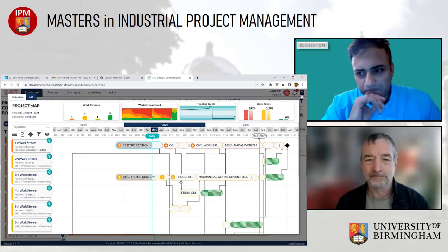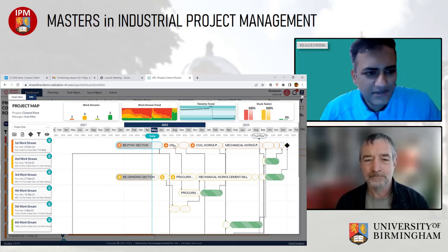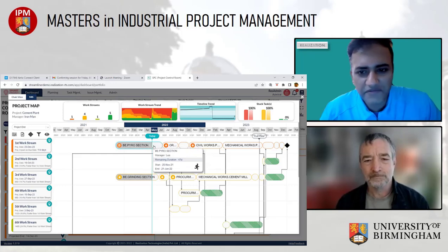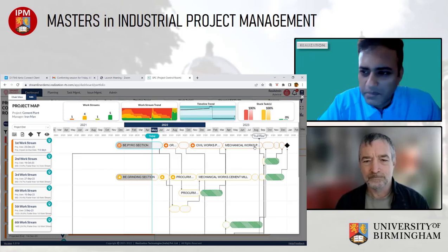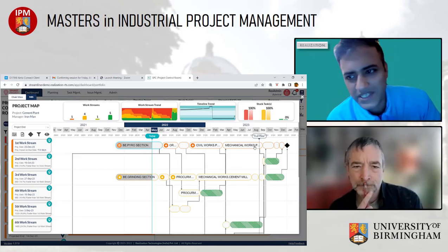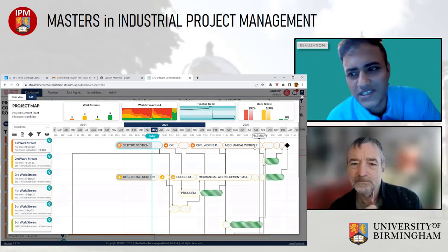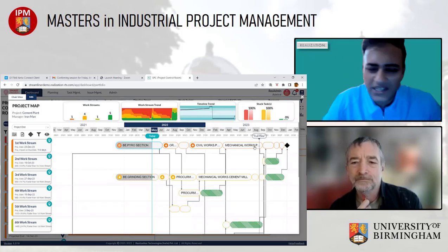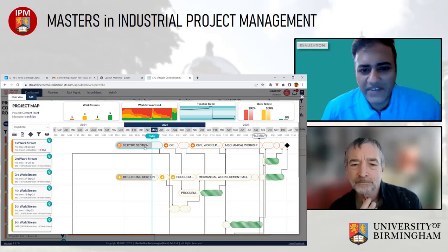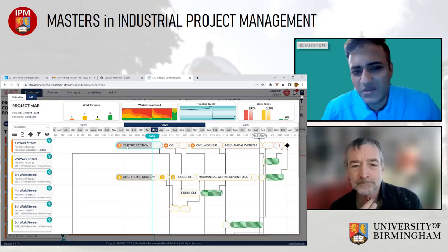Now, this is a direct way to find out how to take my recovery actions, but there is a bigger purpose for this. The basic premise of the logic is that when you have limited resources, you focus them on only the priority tasks. So the basic logic is, as I said, I have 11 engineers, combined I need 20. So you don't need to do calculations. Make sure you put whatever you can on this.